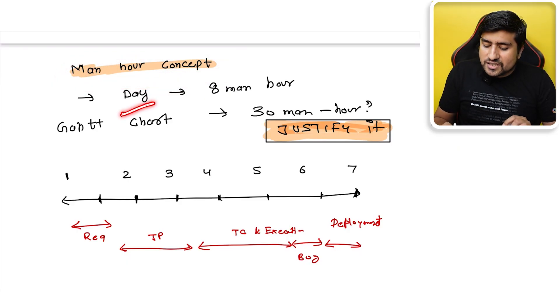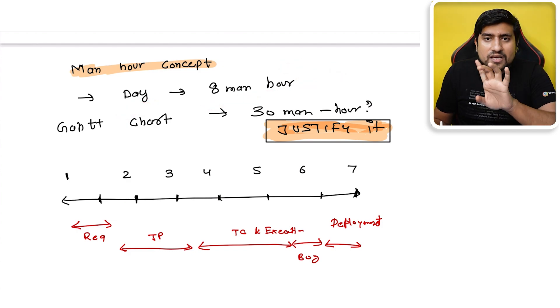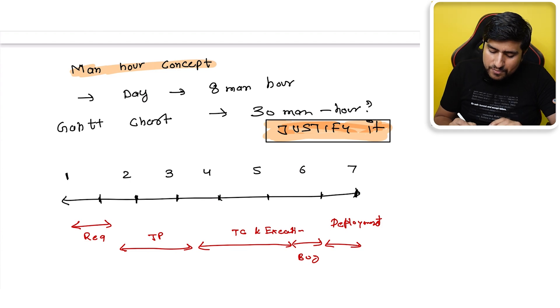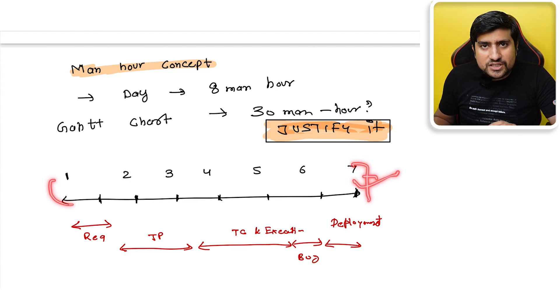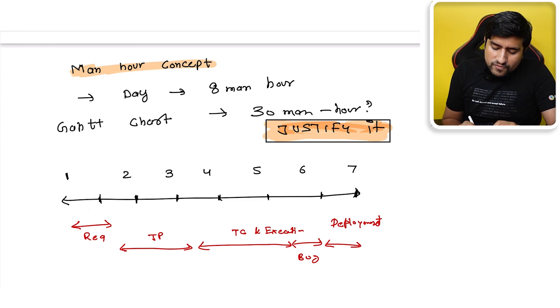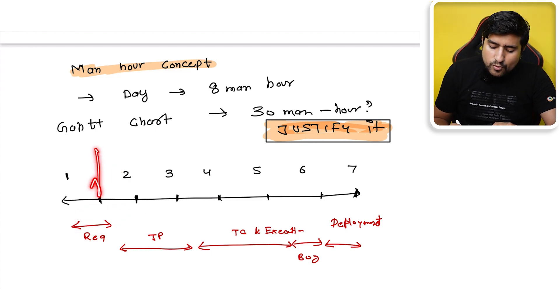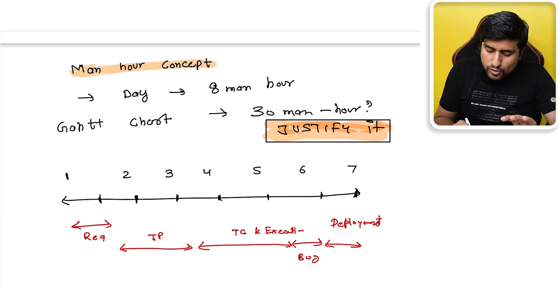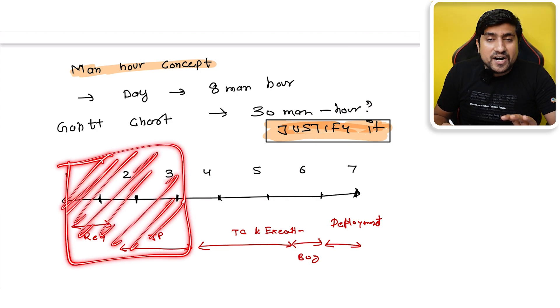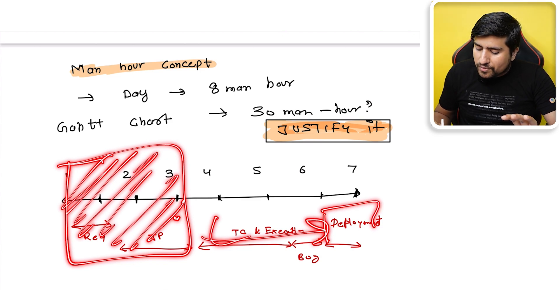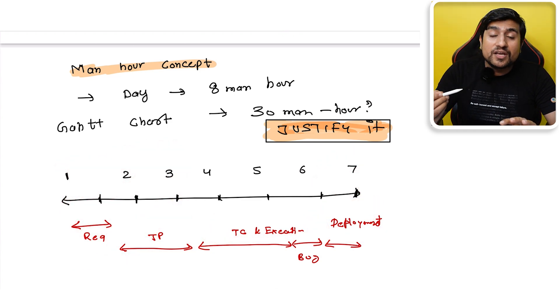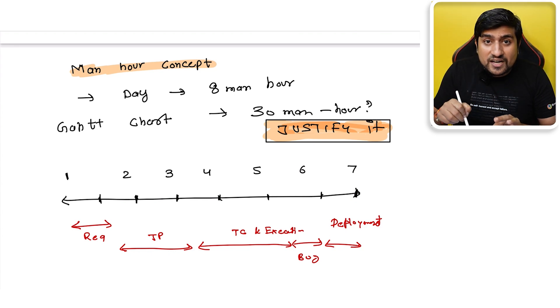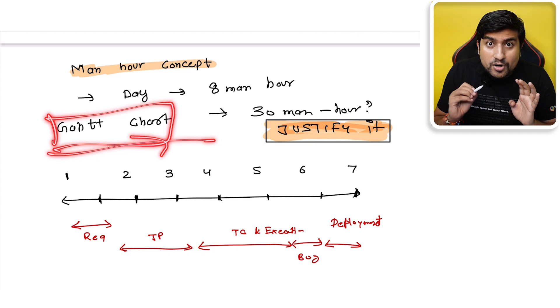The key concept is man-hours. Generally in a day we have eight man-hours — one person gives eight hours. You distribute these across the project. For example, a big e-commerce project might take seven days: one or two days for requirements, then time for test planning, then execution and bug reporting, and the last day for deployment.